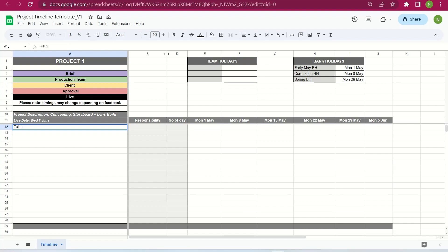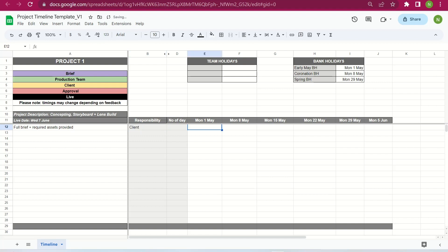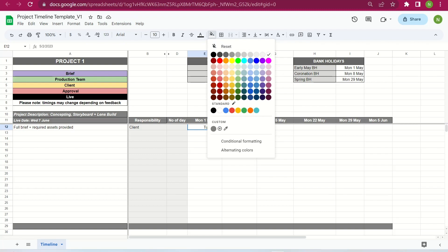We always want to start with a brief. You want to make sure the client has shared the brief and the project assets, so we can put here: 'Full brief and required assets provided.' This would be the client's responsibility — we shouldn't kick off a project without a brief and assets. We can set this as Tuesday the 2nd of May, as Monday the 1st of May is a bank holiday, which we've already noted. So we're one step ahead. We can pop the purple color code there.